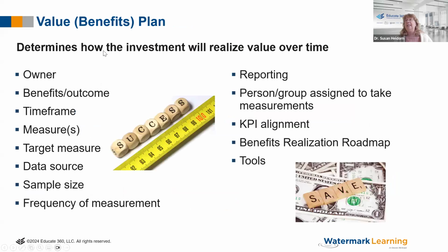And that's the key. So having a value plan, I always attach my value plan to my business case. Normally you can't measure value until after it's been implemented, right? So what is the owner? What's the outcome? What is the time frame? When are you expecting it? Because value doesn't come in a one-time shot. It's not, June 30th, full value, we'll get all that increase in revenue or increase in productivity.